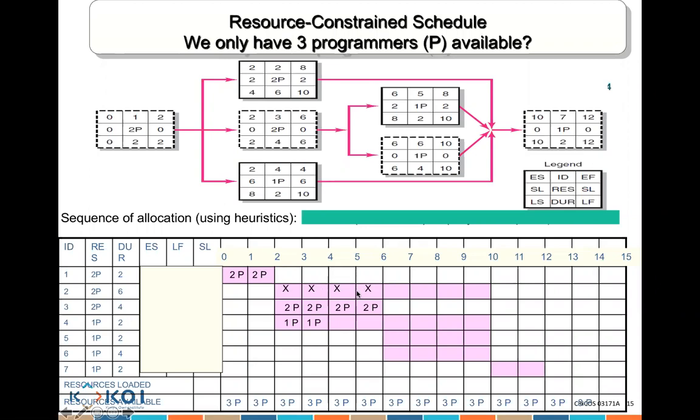Okay, that needs to start before you're going to continue the project, because you are doing every task in parallel. So once you finish that, you're going to have to go and do the 2 people. That's going to be between days 6, because it can't start before, and it's for 6 days. So it's going to go to day 12. And then you are right, we're going to have to go and do activity 6, which is this activity here. 1 person, 1 person, 1 person, 1 person. So we are now maximizing the use of our resources.